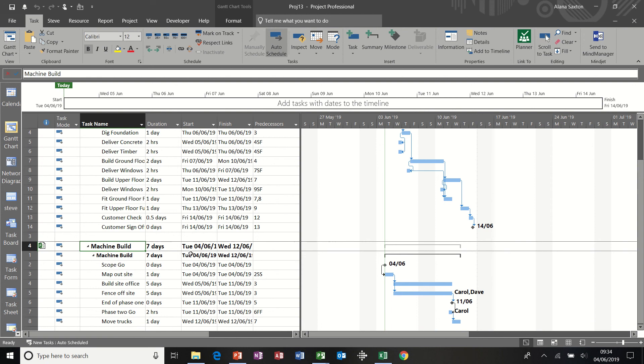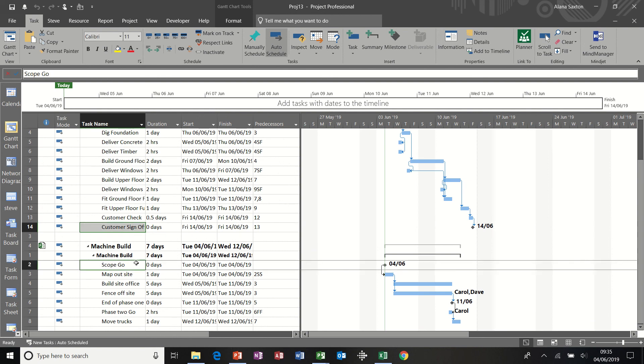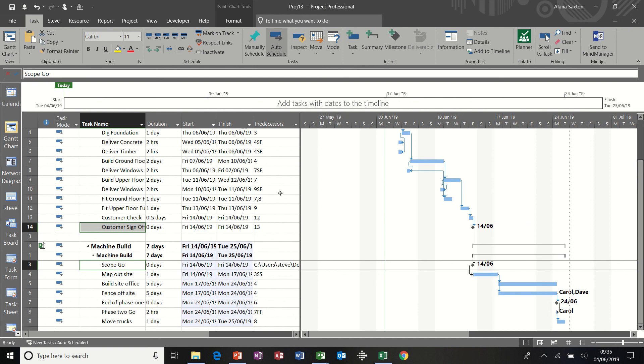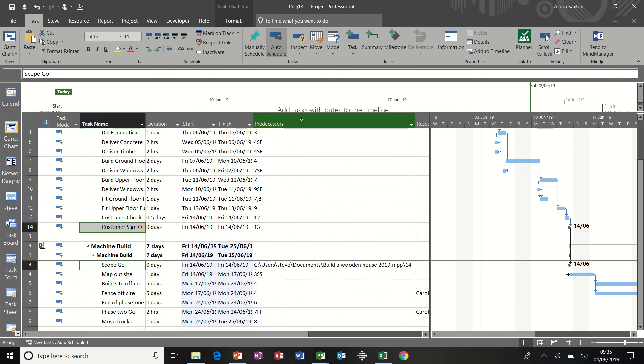And if I want to link between projects, so I want to say this one, this second project follows that first one, I can do this. So I'm holding my control key down. So I've highlighted those two tasks and I'm clicking the chain link. And it puts the file path in the predecessors column. Just widen that up. So it's, that could be quite a long path, but it's following task 14 of that project.